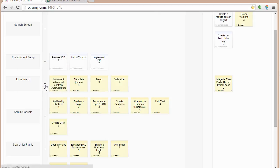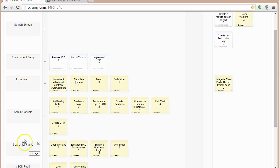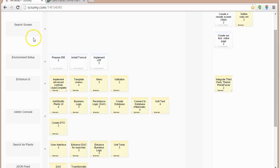But in your design document where I ask for a list of stories and a list of sprint tasks, this is fine. A little Scrumy board with your stories on the left and the tasks on the right. That's what I'm asking for in this assignment. Now, do you have to do every story this semester? The answer is no, you don't. Remember that we're going to pick the stories that we think we can accomplish for the current sprint, and we're going to work on those for this sprint. But remember that the product backlog, which is essentially these stories on the left, the product backlog will grow and shrink through the life cycle of our application. We're never done. Applications are never done. If you've ever written a mobile app, you know that. Because there are always new things, new designs, new quality standards that you have to follow. So it's entirely possible this semester you might not get to all of the stories, and that's okay. It's also very possible that you might find that you're adding stories that you didn't think about before. I wouldn't add them to the current sprint, but add them to the backlog for the next sprint.